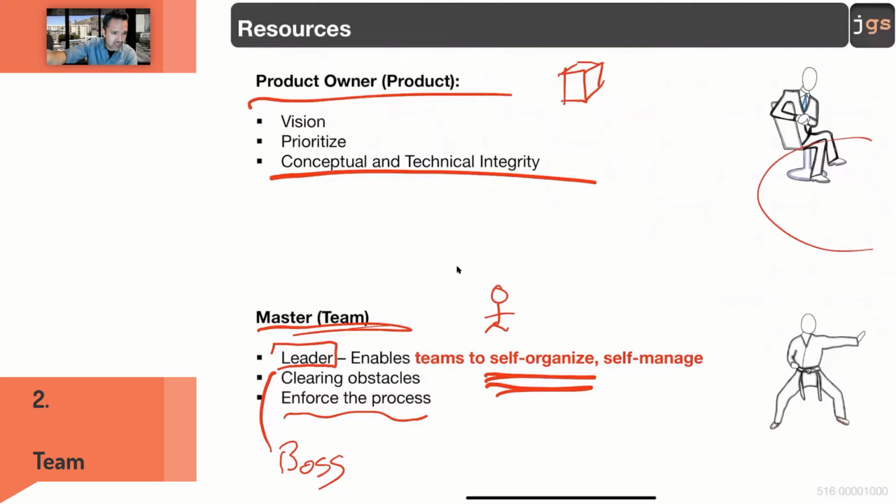And if the majority here think that the complexity is 20, you can vote for one, but we are other 4 that think 20. The average is going to be above 13, 16, and we all should agree with that. It's a democratic team. So the complexity is going to end up being 16, 17, even though one person in the team thinks it should be 1.